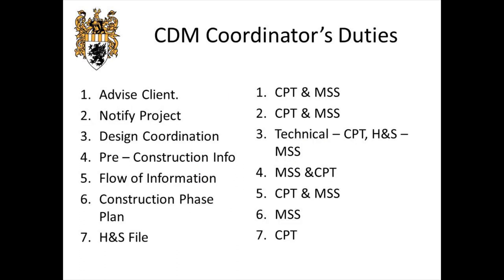One of my principal roles is to assist the capital projects team in discharging the duties of the CDM coordinator. The CDM coordinator's duties are fairly straightforward and are split between me and the capital projects team. The first duty is to advise the client on matters of health and safety — when they can and can't do things, and specific advice on how to do things. Any advice the client needs on sizes, accesses, fire escape routes, and so forth is fed back to them from the two of us.